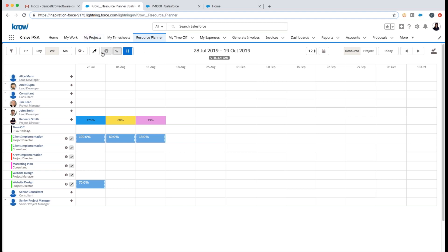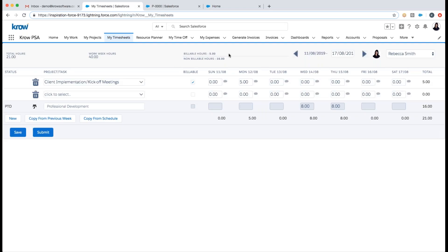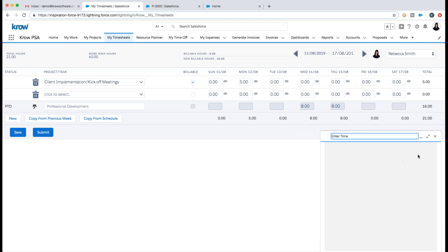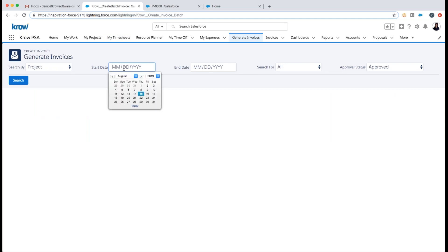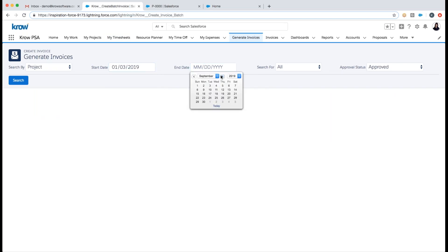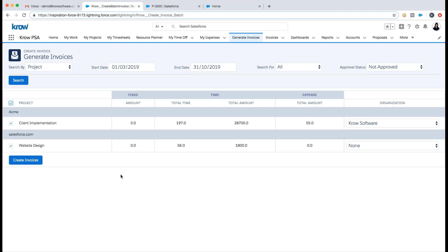After managing projects, tasks, time, and resource planning, if it's a billable project I may want to invoice clients. I can generate invoices — billing events — and the system automatically pulls back any uninvoiced data between the time period being invoiced. Crow supports a number of billing methods out of the box: time and expense, installment billing, recurring billing, immediate or fixed fee, percentage complete billing, and retainer-based project billing for managed services.